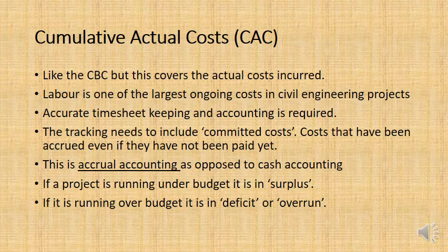And at the end of the 5 weeks, you're going to pay me in a lump sum. It's a lump sum contract. You're going to pay me $10,000 for 5 weeks of design work. Now, this is in cumulative budgeted costs.